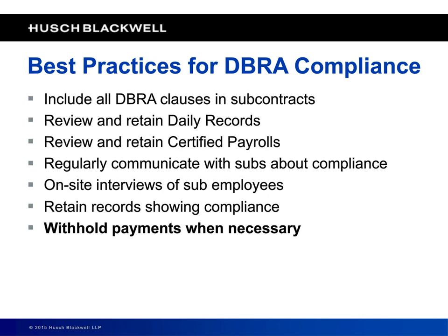Retain all the records that demonstrate compliance. And I'm going to go through the things beyond just the certified payrolls and statements of compliance that you should be retaining. And then the final thing, and I bold it for a reason, the best way to make sure people will comply is don't pay them.